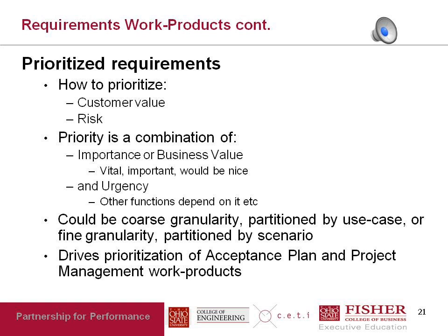Even the non-functional requirements can be prioritized in a more granular manner. For example, you can have non-functional requirements attached to certain use cases that have to be implemented first and so on. So once again, the whole reason for prioritizing the requirements is to give an order to the development process. And this in turn will drive two things. It'll drive what is known as an acceptance plan that we will visit next. And then of course, it'll drive all your project management work products, because the prioritization will determine the order in which work will be done. And so that will determine the project schedule and your release plan and iteration plan and all those other things.